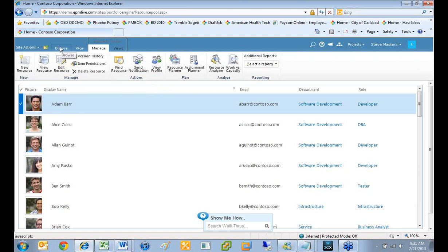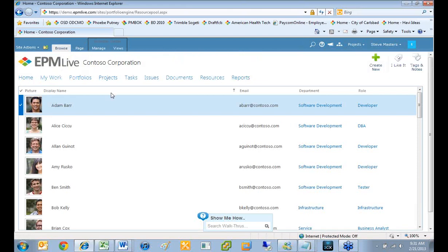We talked about negotiations, but I just wanted to make sure that that was all clear. So the negotiation was really from the project manager requests the resources, then the resource manager comes into this resource tab, they approve them, and there's this back and forth. And it can be more complicated than that if the resource manager comes in and says, hey, you can't use Adam Barr for this, I'm going to propose another resource. Then a notification goes back to the project manager and they say, hey, I need a different resource because they don't have the right skill set, right? This process can go back and forth many different times if needed. And so it can be a complicated, time-consuming process, but it doesn't have to be as well. You could just have it so your project managers put in what they need, and that's that done.